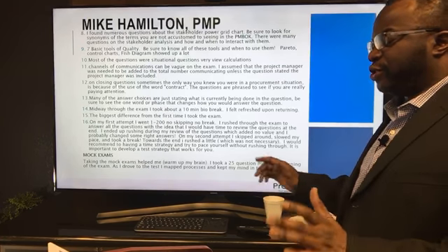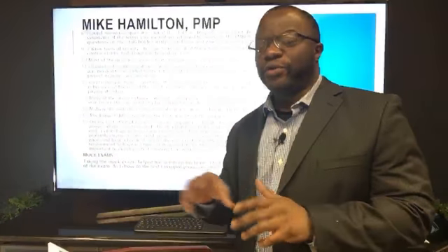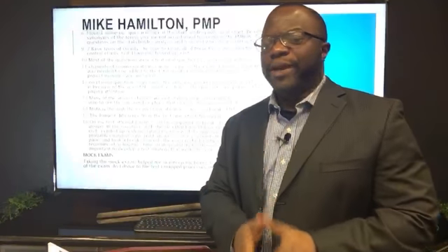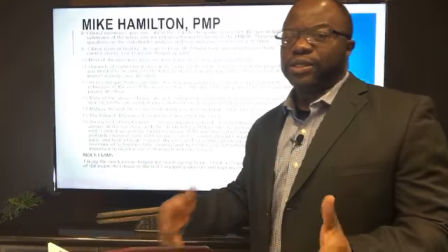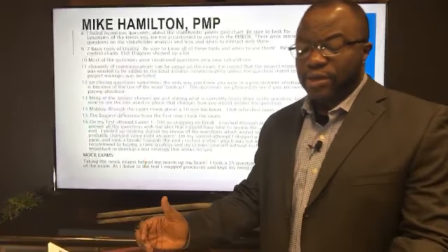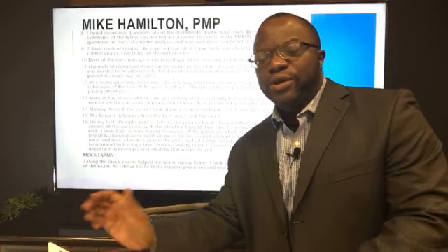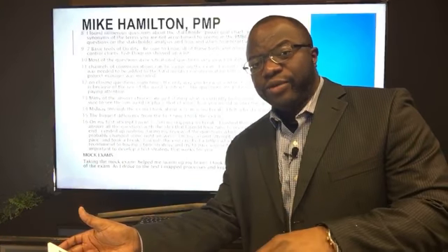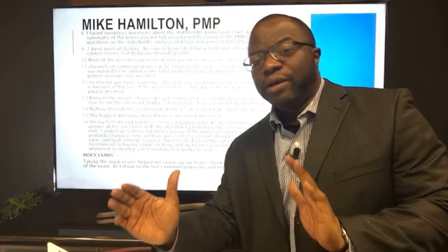So what they're trying to do is trick you based on subtleties, but you have to hone in on those subtleties. So again, you are a project manager on a project. You have 10 people reporting to you. How many channels of communication are there between you and the team? Versus there are 11 stakeholders on a project. How many channels of communication are there among them? PM's already in there. No need to add a PM. They're only asking about the stakeholders mentioned in the question.